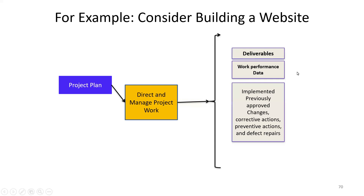In this process we also work on previously approved changes, corrective actions, preventive actions, and defect repairs. Corrective actions address issues where things aren't working — you send work for rework. Preventive actions ensure stories are understood properly and include team training. Defect repairs address any defects. These changes don't require a change request through the integrated change control because the baselines are not being changed.